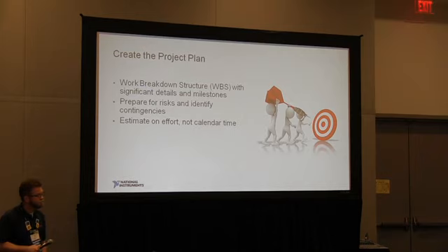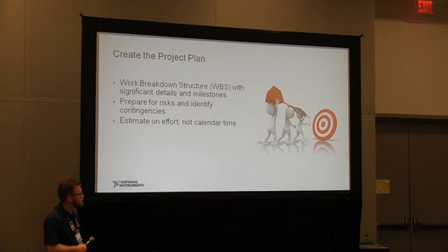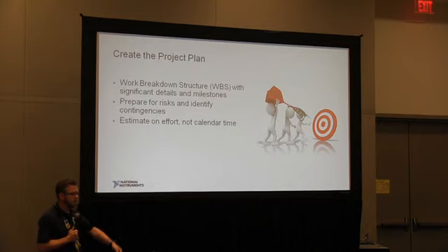And as you create this work breakdown structure, for each task, estimate on effort, not on calendar time. Don't just say, this is 3 days work, but really try to focus on how many hours of effort you think the work is.